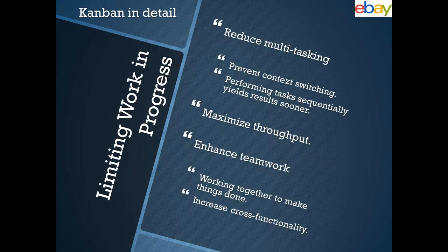Why is Kanban asking us to limit the work in progress? It reduces multitasking. By reducing multitasking, you prevent context switching and perform tasks sequentially, which yields sooner results. You can maximize throughput and focus. It also enhances teamwork — you work together as a team. For example, if in the to-do list there are a lot of tasks not moving to the next column, the whole team can work together to move them to the in-progress stage, increasing cross-functionality where each role can help the others.